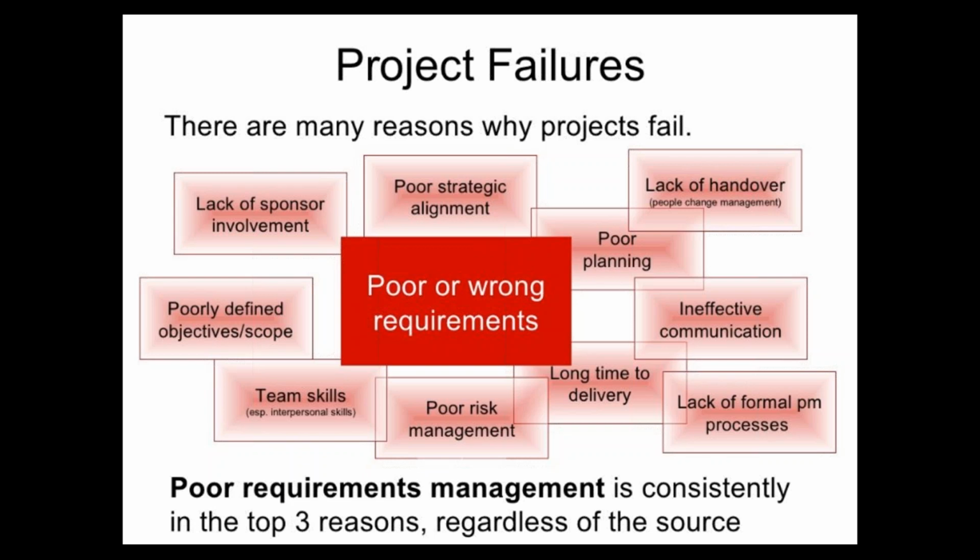As a project manager, whether they know C or Java or C++, that is not the important stuff there. What a project manager should do is, within that given schedule, check: do we have the required resources? Do we have that expertise? Okay, you want C, you are going to do it in C, but do we have that resource? Should we hire them or should we get them from a bench? Are there C programming, Java programming, .NET programming resources on the bench? Should we get them on board for this project? So overall,